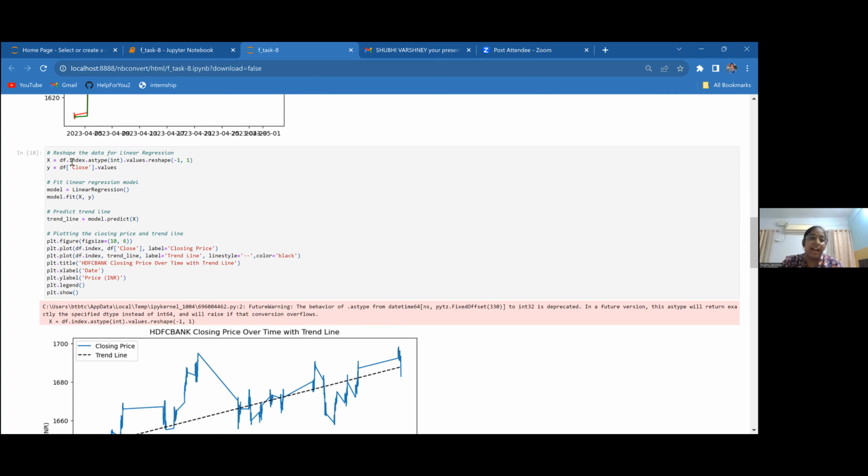It also identifies and addresses risks early in the development process, reducing the chance of major issues in later stages, and frequent customer involvement leads to a better understanding of their needs and expectations. All these things reduce project failure, because by addressing issues early and continually improving the product, the risk of project failure is minimized. It is suitable for complex projects, particularly those with evolving or unclear requirements. When the requirements are not clear, we need to use the iterative model.